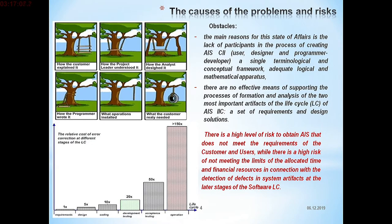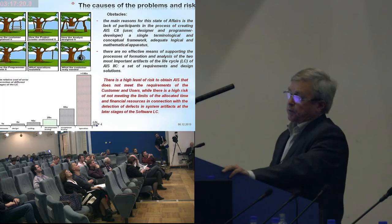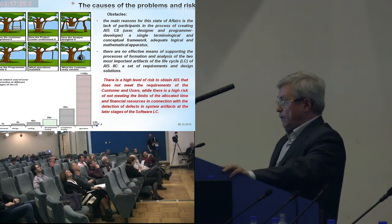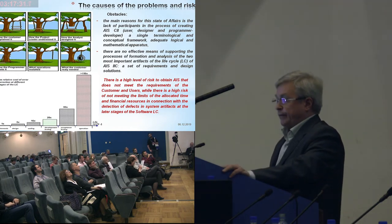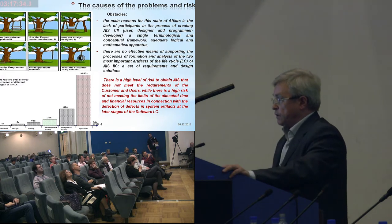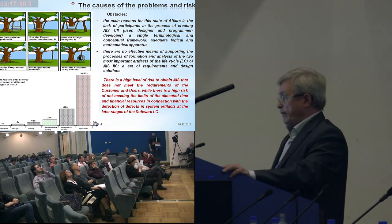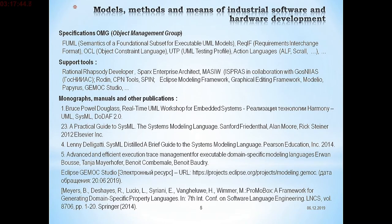You can see the picture at the bottom which shows that the cost to fix deficiencies goes exponentially up depending on the stage. At the stage of use of the system, if a deficiency is identified in the requirements, the cost of fixing increases hundreds of times.